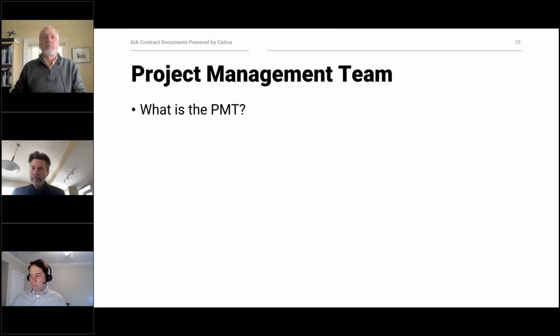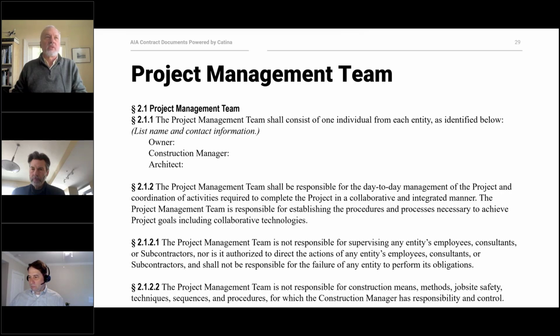So, what is the PMT? The PMT, as we're defining it now, is the project management team. And the project management team is to be identified with one person from each of the major entities here. And through our discussions, it wasn't to be wide open where you have a conference room. It's 3 people who can make decisions mostly on the day-by-day management of the project and who are working together to achieve the mutual goals.